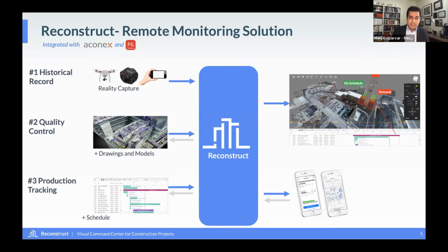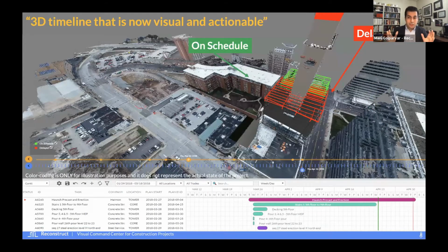What is there versus what should be there can also be mapped in the context of the schedule, so you can start tracking progress. Everything is in a cloud-based system, and that means any user, an unlimited number of users, can log into the platform and immediately see one picture that speaks the truth of the most recent state of work in progress on the job site. A picture that is completely in 3D, mapped against the design. The design is integrated to the schedule, so now you can see 4D BIM against that reality. Again, any location, task, or work package on the schedule can be color-coded accordingly.